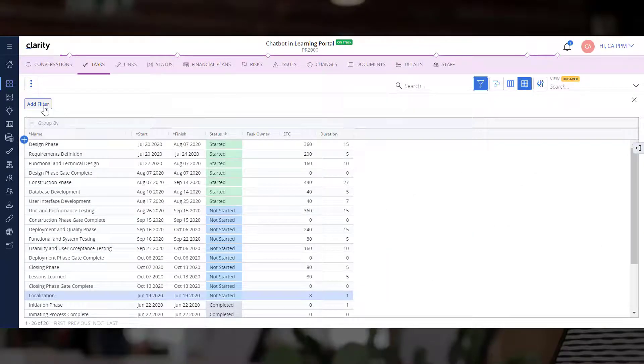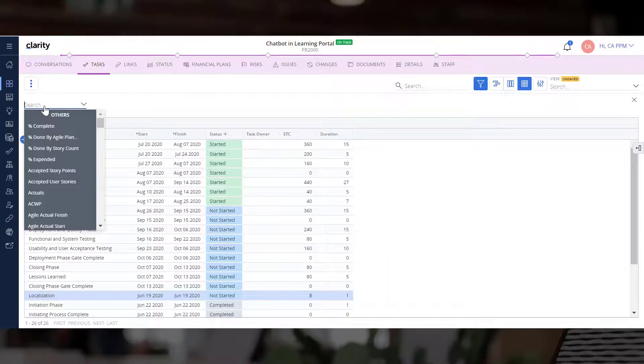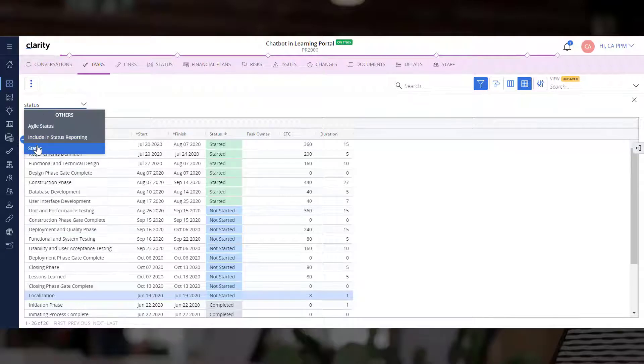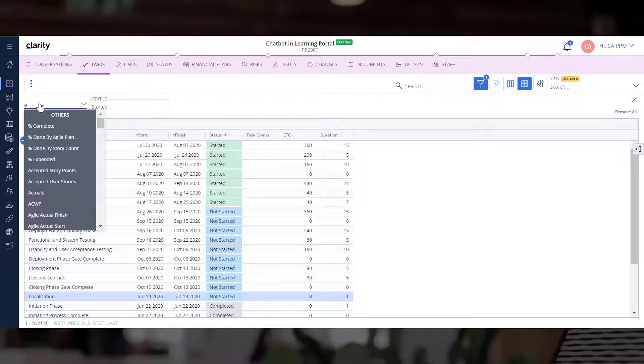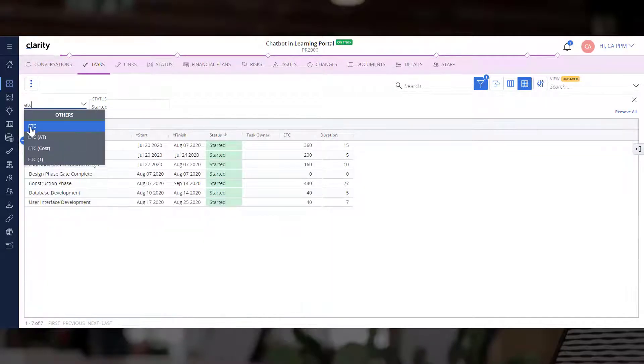Finally, let's use the Filter option to identify all tasks that have started but have more than 40 hours of work to be completed.